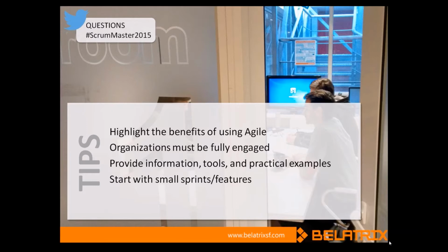Sometimes it works, sometimes not, so you can change the decision while you are working in the first sprint. And the last one is just to suggest starting maybe with Kanban. As Carla mentioned, Kanban is probably good when you don't have previous experience working with any other Agile methodology. And then you can also work with the client to have a good transition to Scrum. That is probably the methodology that we suggest when we work in Agile. So, well, these are the tips that I can give about this topic.